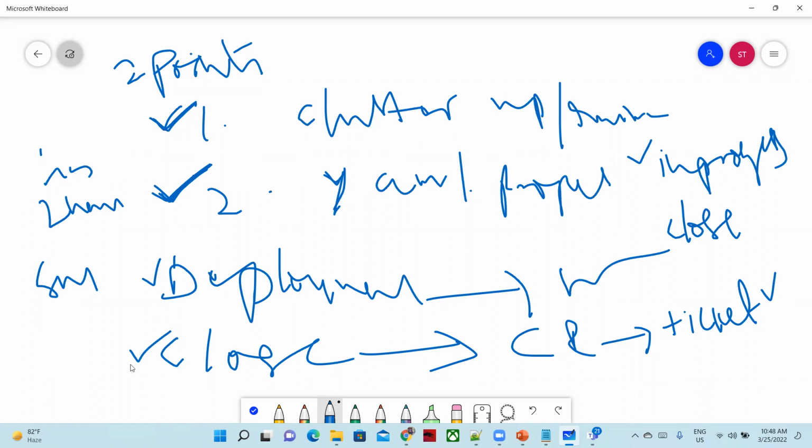So at the last, once you are done, log into your ServiceNow tool or whatever tool the customer is using, go to your ticket, close your ticket, and again send an email notification to the stakeholders: the respective CR is closed successfully. Simple line. The respective CR, meaning change request, is successfully completed, hence we are closing the ticket. Then you clap and you go, and you can enjoy.